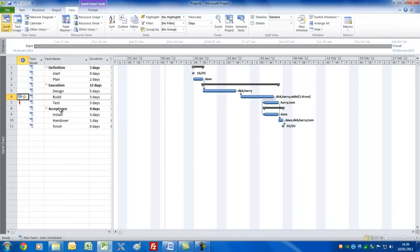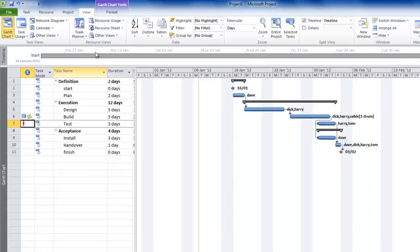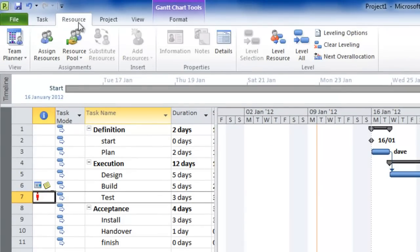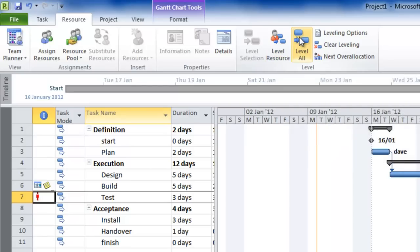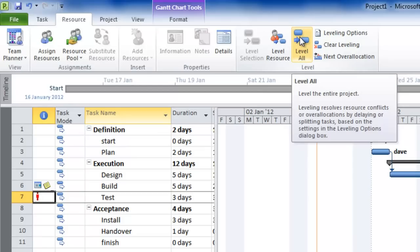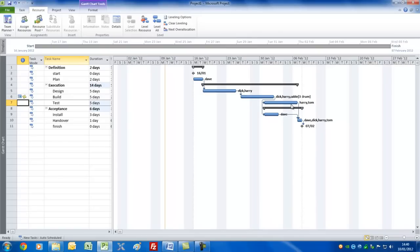The next thing we need to look at is whether we've got any problems with resources. Clearly there's one here — Test — which has a little red figure showing this task has resources with problems. Right-click and you can fix it in the Task Inspector view, or you could get Microsoft Project to reschedule the task to a later date. I'd like to show the traditional way: go to the Resource tab, where you can see the Level Resource command. I'm going to press Level All to fix it in one fell swoop. Project will try to fix the problems by delaying or splitting tasks. Sure enough, it's increased the duration of some tasks to fix the over-allocation, and we now have no resource problems.